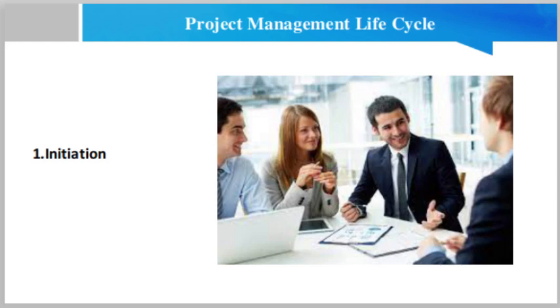First one is the project initiation. The project initiation phase is the first stage of turning an abstract idea into a meaningful goal. In this stage, you need to develop a business case and define the project at a broad level. In order to do that, you have to determine the need for the project and create a project charter.